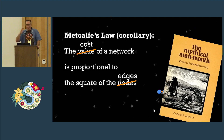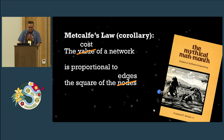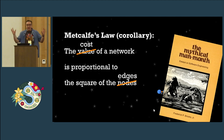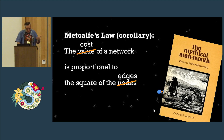This relates pretty directly to an old idea in software engineering from 'The Mythical Man-Month': as projects get more complex and more behind schedule, just adding more people doesn't help because communication overhead starts to take over. A lot has changed since 1975 — we have much better tools for asynchronous collaboration like GitHub and GitLab that really chip away at those communication overheads. But even the greatest communication and project management tools can't design how these projects need to connect — that is still very much the human pursuit and the work.